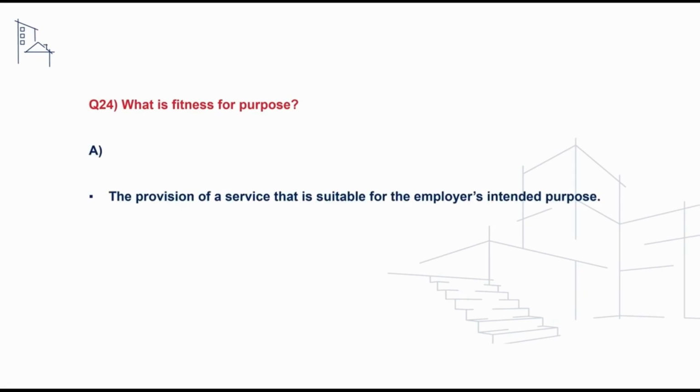And to address this, the candidate can advise that fitness for purpose is a contractual obligation where the provision of the service being provided must be provided to the level where it's suitable for the employer's intended purpose. And this is a much more onerous obligation than reasonable skill and care.